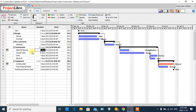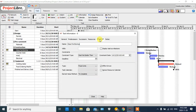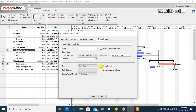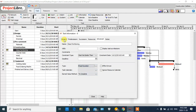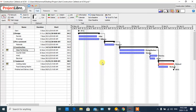If our task is independent of the number of personnel, we can double-click on it, click on 'Advanced,' uncheck 'Effort Driven,' and check 'Fixed Duration.' Then in the 'General' tab we change the five days back to ten days. As you can see, the task comes back to a ten-day duration.